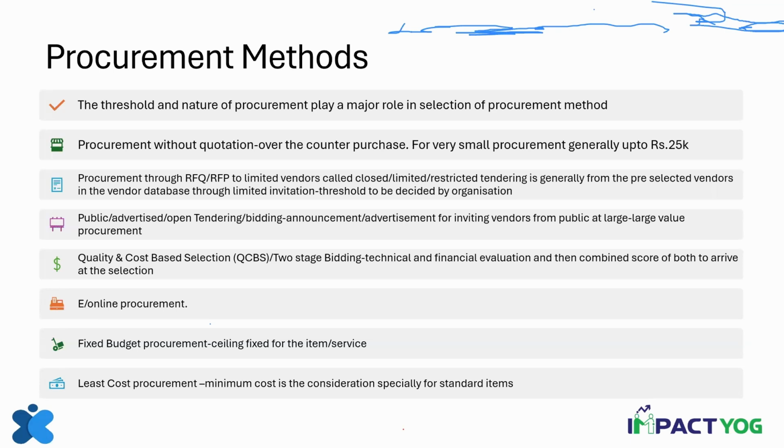This is only based on verbal understanding of what the cost will be, and that will be recorded on a piece of paper, and that comparison will be just preserved, and based on that the order will be placed. So we are not asking the vendors to give us any formal quotation or bids.